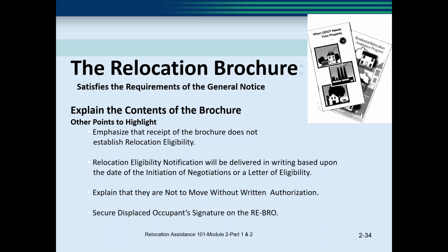You need to emphasize that receipt of this brochure does not establish their eligibility. The relocation eligibility notice will be delivered in writing based upon the date of initiation of negotiations, or a letter of eligibility. You need to explain that they should not move without written authorization, or they may jeopardize their benefits.